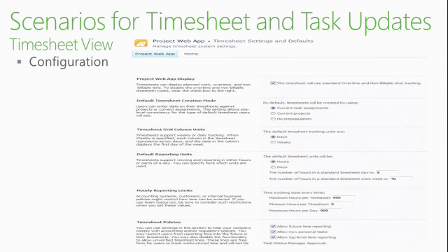So if I leave that at 8 hours a day, and he reports 8 hours in regular time, can I put 4 hours in overtime? Or it probably won't let me do that because I'm only saying 8 hours a day here. What I'm saying is I don't want people to put more than 8 hours a day. Right. But I also want to know what they reported beyond 8 hours. Yes. If I do it this way, I won't be able to report anything in the overtime. No, as long as you specify that you allow the users to enter overtime, they will be able to enter additional time for overtime. You have different buckets for overtime versus regular time.